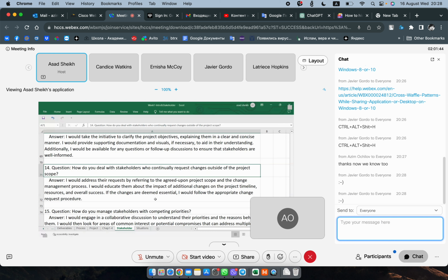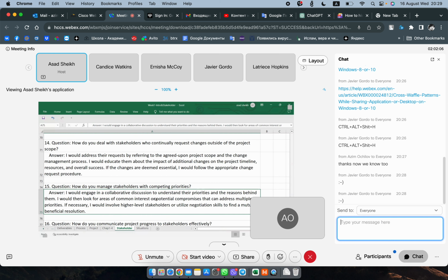So you have to do that to deal with it, but the first few things you have is impact analysis. After impact analysis will be change control. So change control is another thing that you have to add on to this. Listen, understand, meet, explain sometimes, impact analysis, then change control. So that's the sort of steps you have to memorize in your head for all these different variations of the same question they're going to be asking you in different ways.